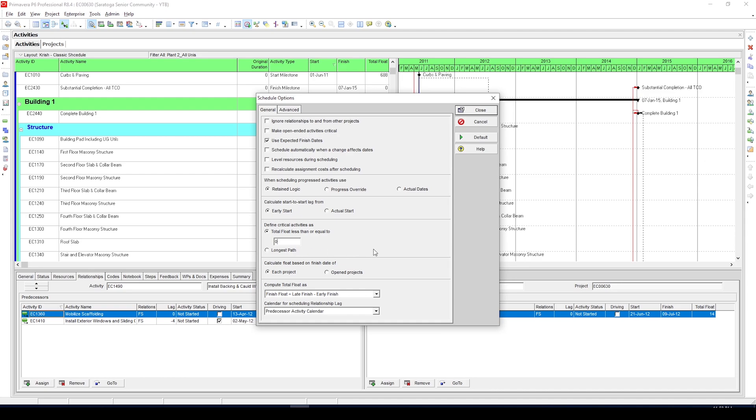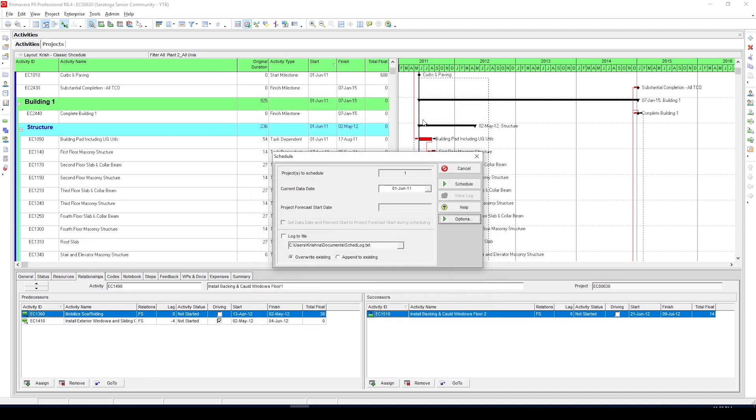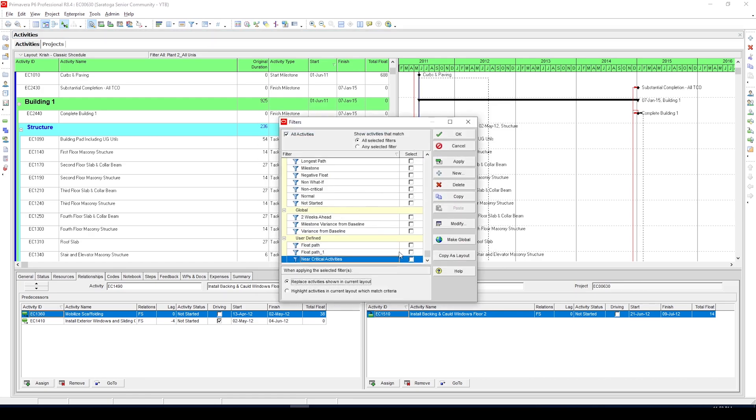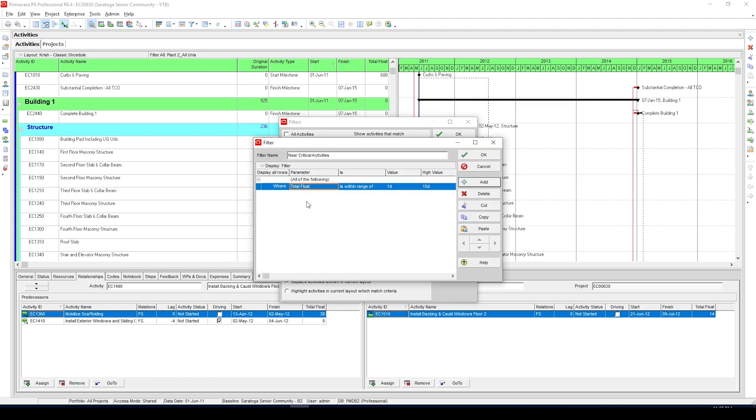Now once you do that, close this dialog box and go to filter. Here you can define near critical activities by creating a filter like you see on my screen, where I have defined near critical activities as activities with total float between 1 and 15 days.